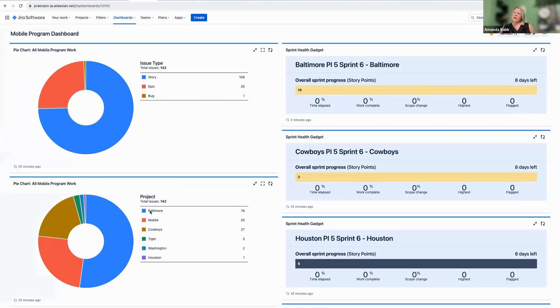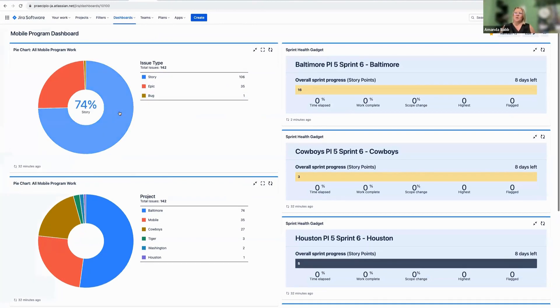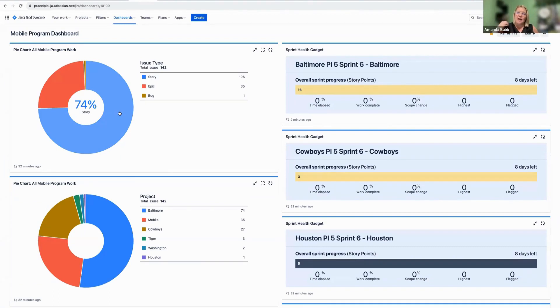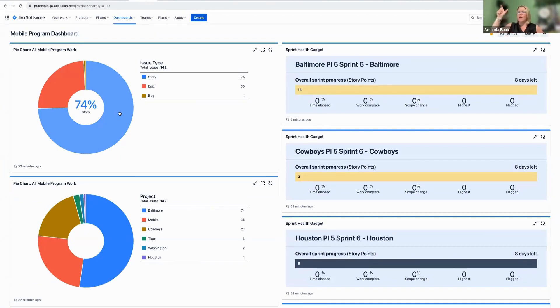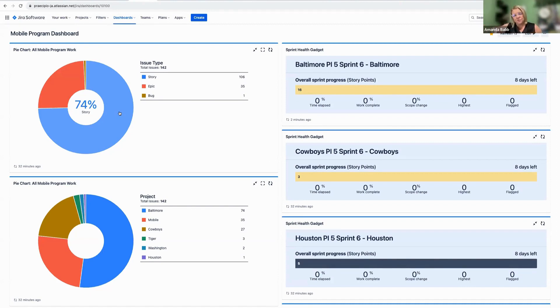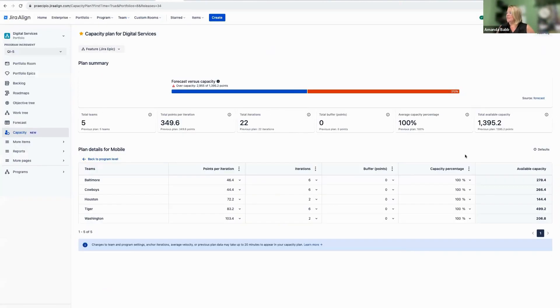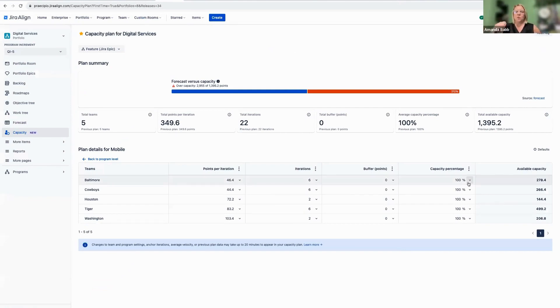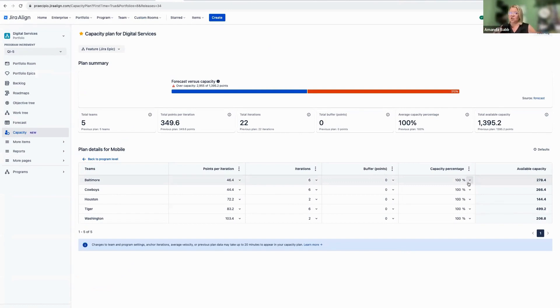In this particular case, we see our story, our epic, and our bug work. Our bug work is less than 1%, so 99% of our capacity is for feature and new story work. Awesome. We can then take that back and put each of our program team's capacity at either that 99% or 80% or 60% to give us a better idea of what they're going to be able to actually handle.